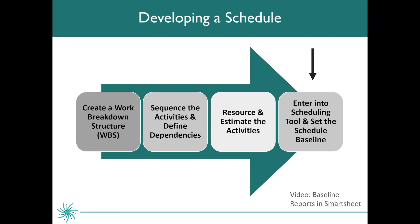We have now resourced and estimated the activities. We know what human resources we're going to require — as far as skills go — for the lowest levels of our work breakdown structure, those work packages. We have also estimated the durations of each activity and the costs associated with each one. Now we're going to enter all of this information into a scheduling tool and set the schedule baseline.